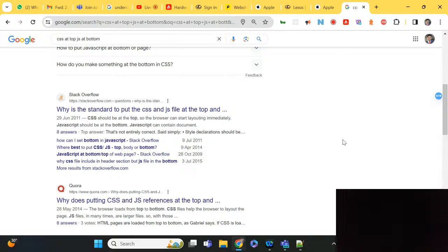Right? We need to ask what browser stack and what mobile stack we will be supporting for the website. And we need to suggest to him the standard browser stack and mobile stack suggested by the market for any website, and that this needs this much extra effort. If you are okay, we will go ahead, and if you are not okay with the extra effort because of the cost, we are fine, we will deliver as it is, because an informed choice hurts less than an uninformed one.